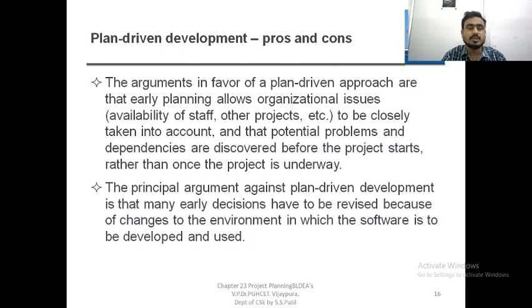Plan driven development advantages and disadvantages. The arguments in favor of the plan driven approach are that early planning allows organizational issues, that is, the availability of staff, other projects, etc., to be closely taken into account, and the potential problems and dependencies are discussed before the project starts rather than once the project is underway.